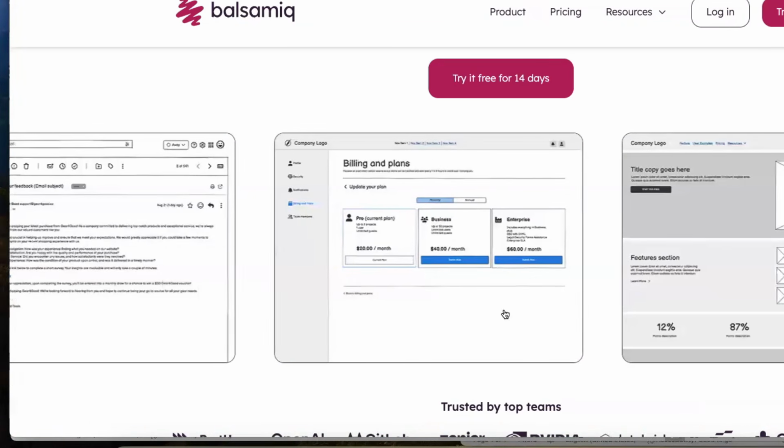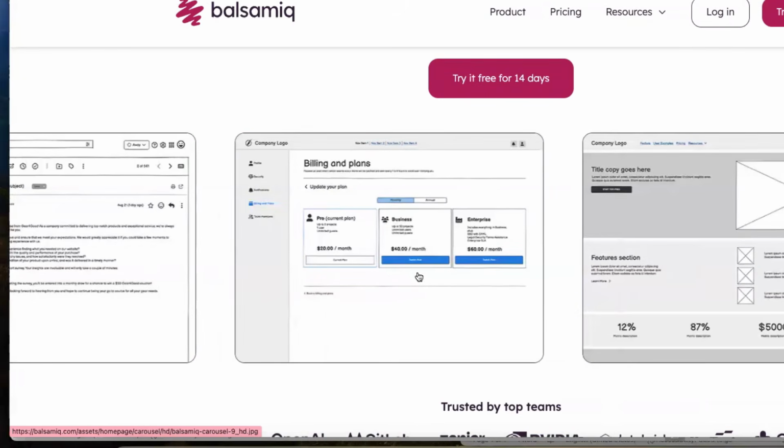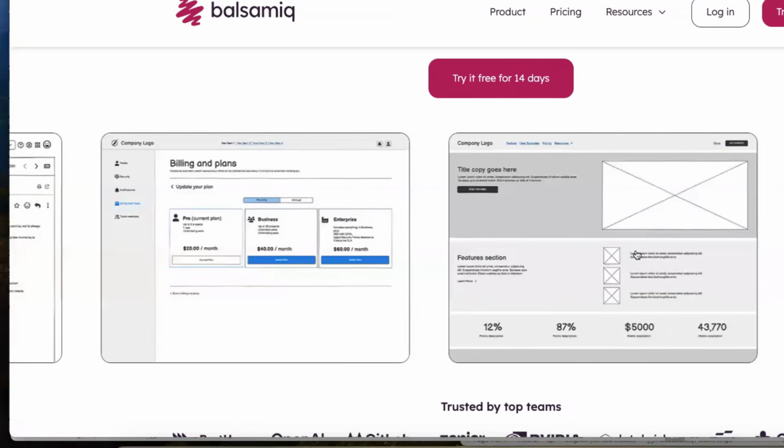If someone says, yes, Shruti, give me a page for billing and plans, and this is where the company logo should be, and these are the three plans to showcase, you need to draw this and review it with the business owners. Once they give sign off, this is the final thing, and you tell the developer to develop like this. That's all. So wireframes are used especially with UI, user interface.